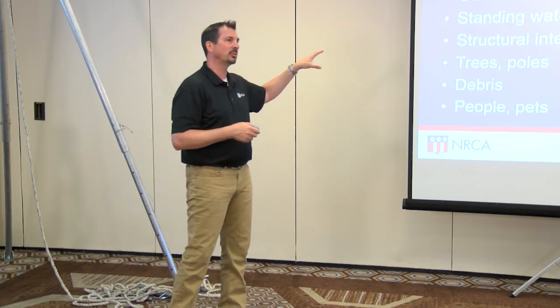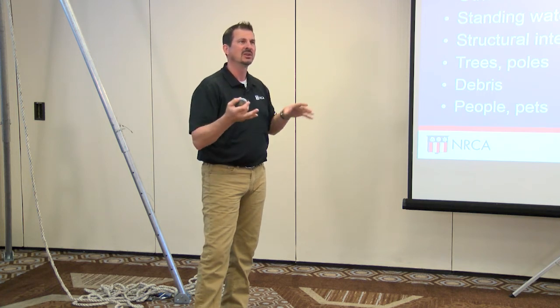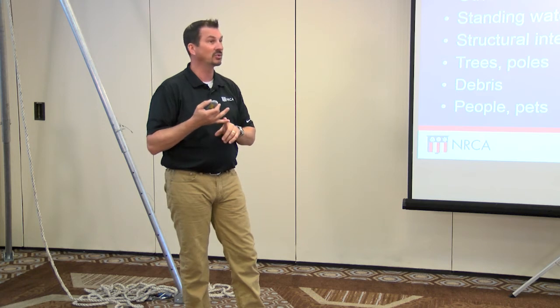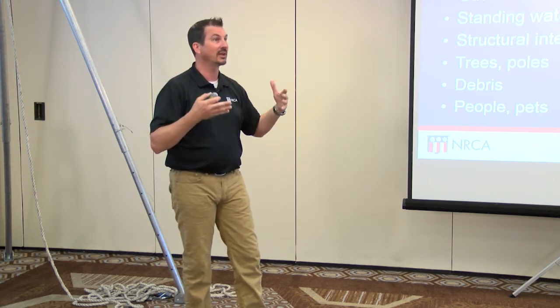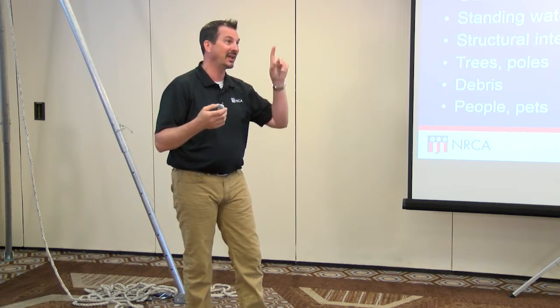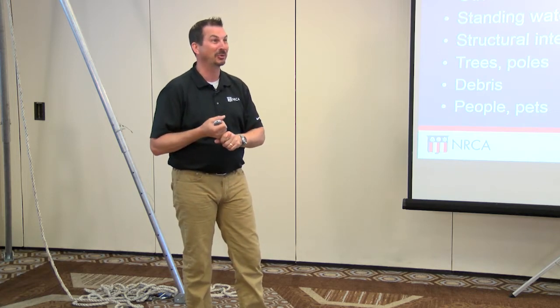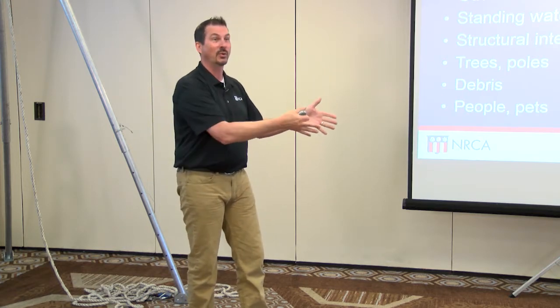Now, one of the things about the preliminary assessment that I always told my salesmen and my safety directors was make sure that when you go out on this preliminary assessment, you're taking photos, and if at all possible, take video of all the information that's out there and the job site they're going to be working on. As roofers, I think we've all had to pay once or twice for cracked concrete or some asphalt repairs that not necessarily were our fault, but we ended up forgetting to do anything prior to the job to recognize those.